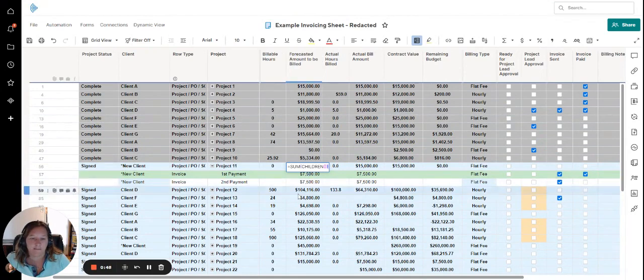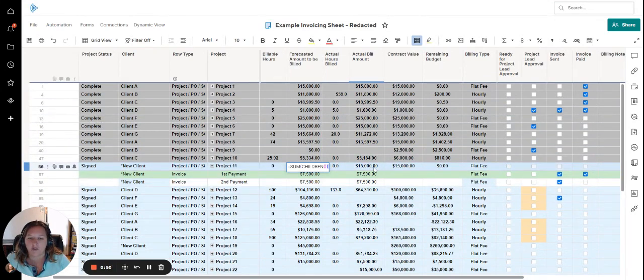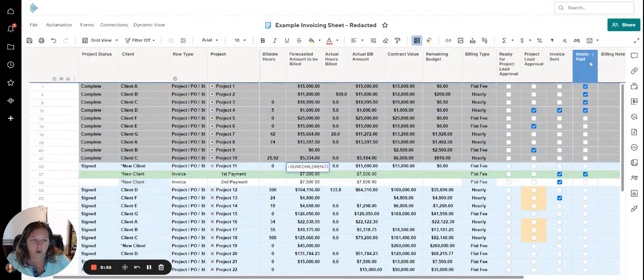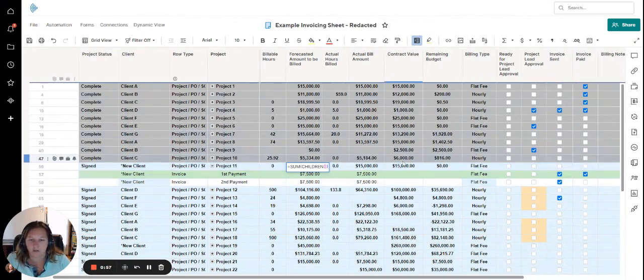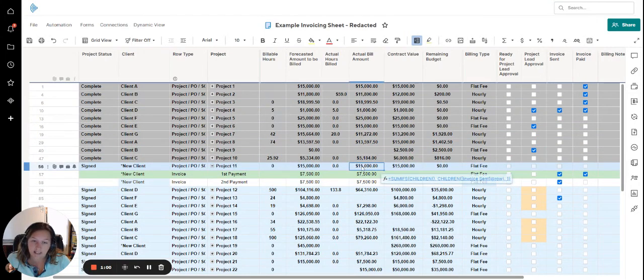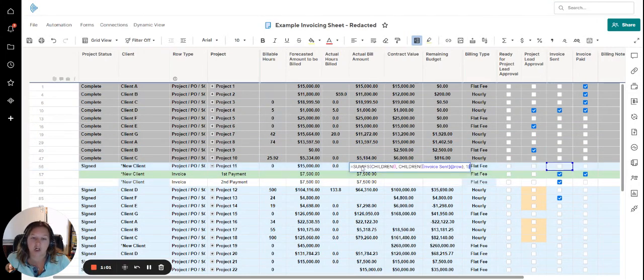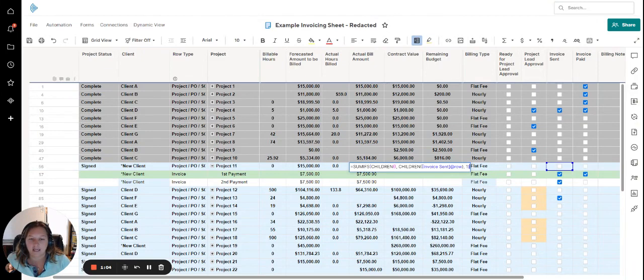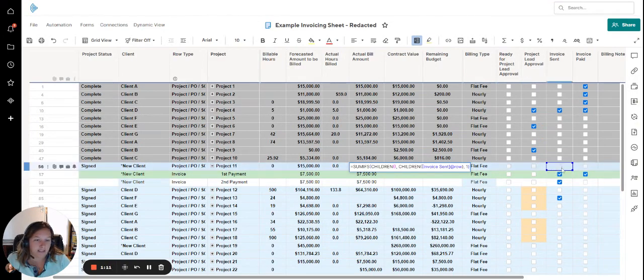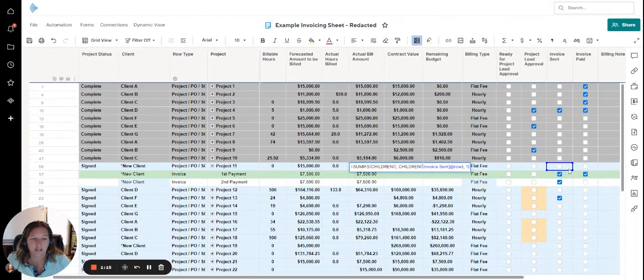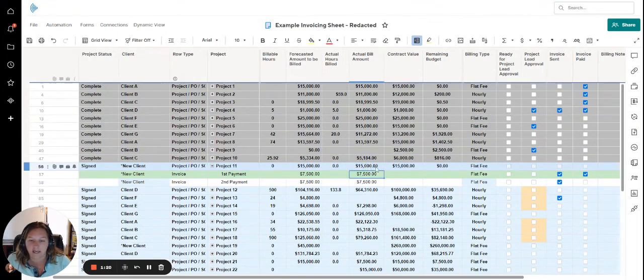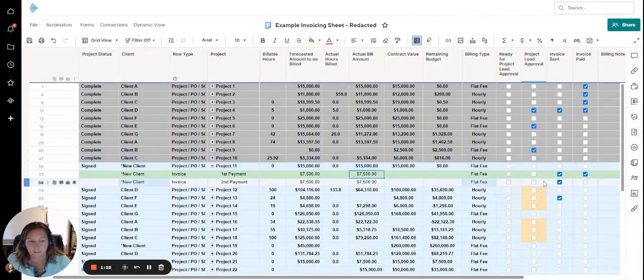What if I wanted to sum only if an invoice has already been sent or only if an invoice isn't paid? In this case, I'm using a SUMIF formula and I'm summing the children tasks where it's looking at the invoice sent, whether it is checked or not. If I click enter here, you'll see that right now it's summing and it's $15,000, the same as the sum.